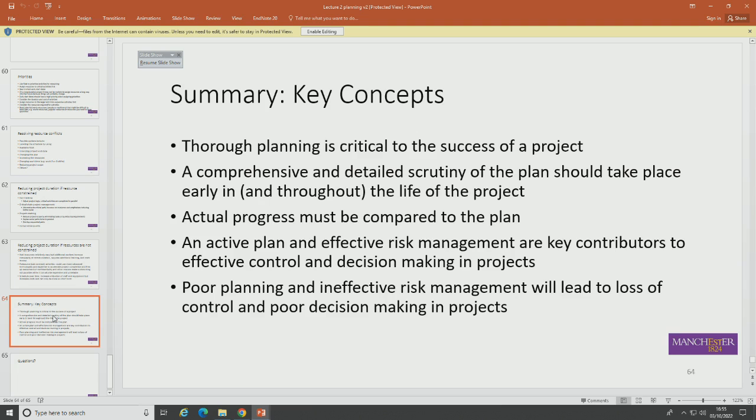If it's what they call a drop deadline, it's got to be done by this time, because you start to lose profit and availability, and you start to crash projects, and you start to bring in resource at all costs from outside. You would also leave yourself some contingency, so you'd be very good at risk management, so you would have an effective risk management plan, you'd have contingency resources, and you would use crashing techniques. So you'd shove lots of resource onto any problematic activity and get it solved as much as possible. Risk management, and crashing of the project, is important.